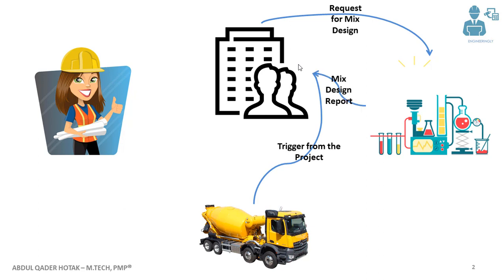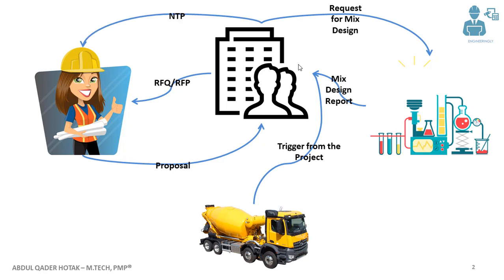Once the mixed design report is prepared, the company will send an RFP or RFQ to the contractor. The contractor will send out their proposal for the work to the company. The organization, in response to the contractor's proposal, awards the activity to the contractor and sends out a notice to proceed. Once the contractor receives this NTP, they send out their human and physical resources to deliver the activity.